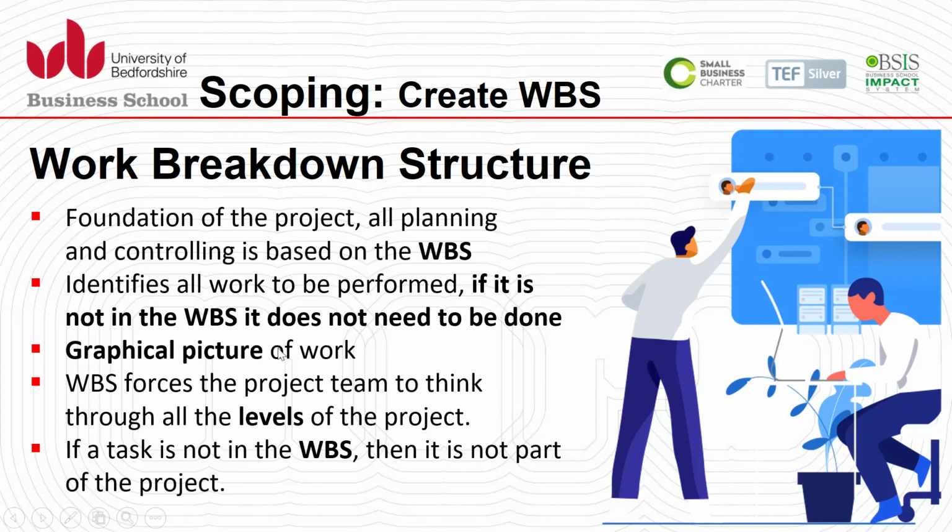If it is not in the work breakdown structure, it does not need to be done. Anything outside the WBS is out of the scope of the project. The graphical or pictorial presentation of the work is basically the WBS, which shows the work in a graphic or pictorial structure.